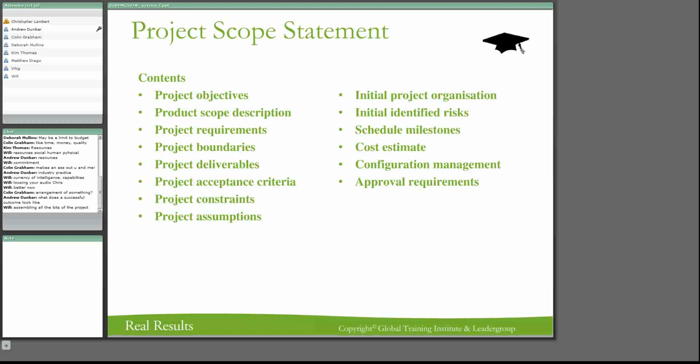If you're working in a functional organization, this is absolutely critical, because of the delegation rights: how much, and who needs to approve at what level. Now, it might be that the client or a project board might be the only one that can approve a change that needs a budget change. Does that make sense?